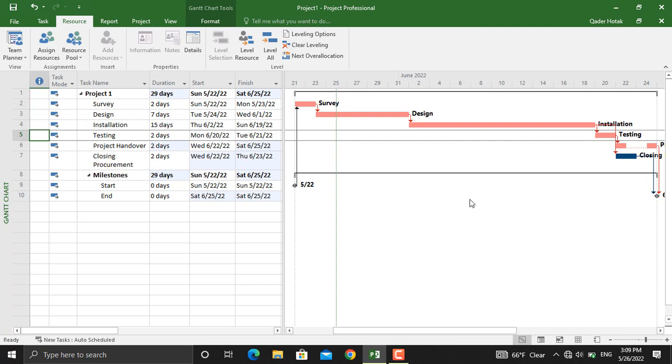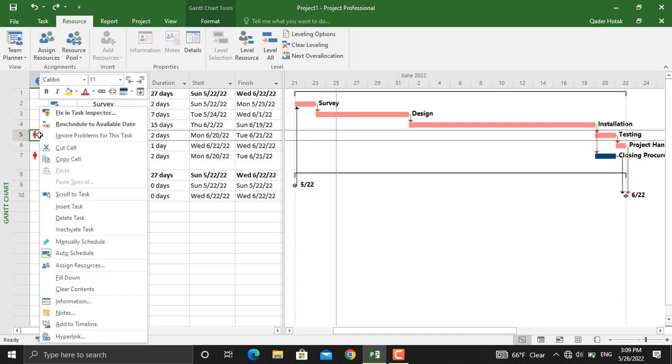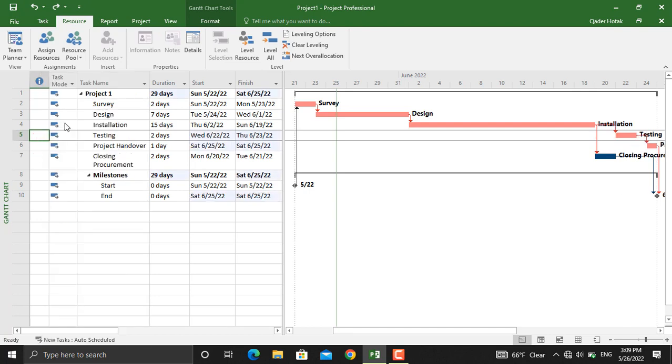If you right click and go to reschedule to available date, it will move the whole activity. For example, as you can see, the testing is moved after the closing procurement is completed, which means that Alex is free and then he can perform the testing.